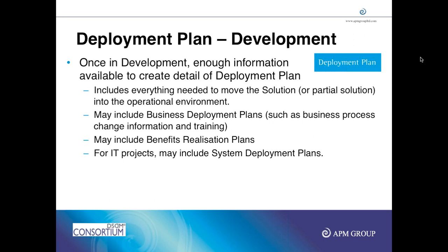One other thing the deployment plan also talks about is benefit realization plans. That is, when the project is over, as part of post project, what kind of reviews should be done, and also who does the review, when, and what they are going to measure and how they are going to report it. Deployment plan planning is done as part of the engineering phase, but it is executed as part of the deployment phase. That is after engineering is completed, when the solution is ready to go live.